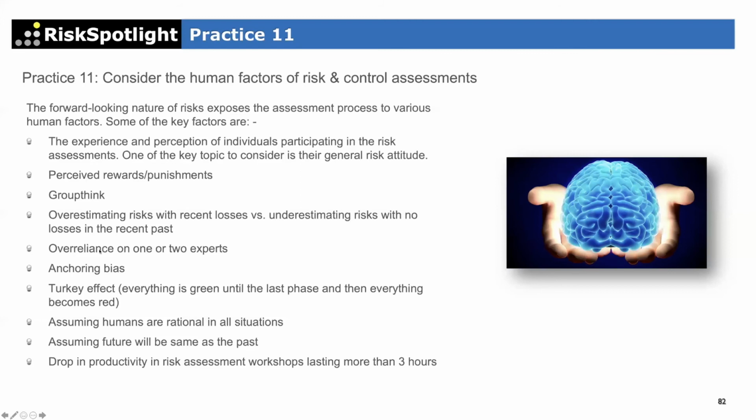Similarly, if we are over-relying on just one or two experts, so if the assessment is done by just one person who didn't talk to anybody in that business unit, then we know it's going to be a very poor quality assessment. So the over-reliance becomes that element where, as part of the risk assessment, we want some discussion to happen. In a lot of ways, that discussion is a lot more important than the values of likelihood and impact they provide.